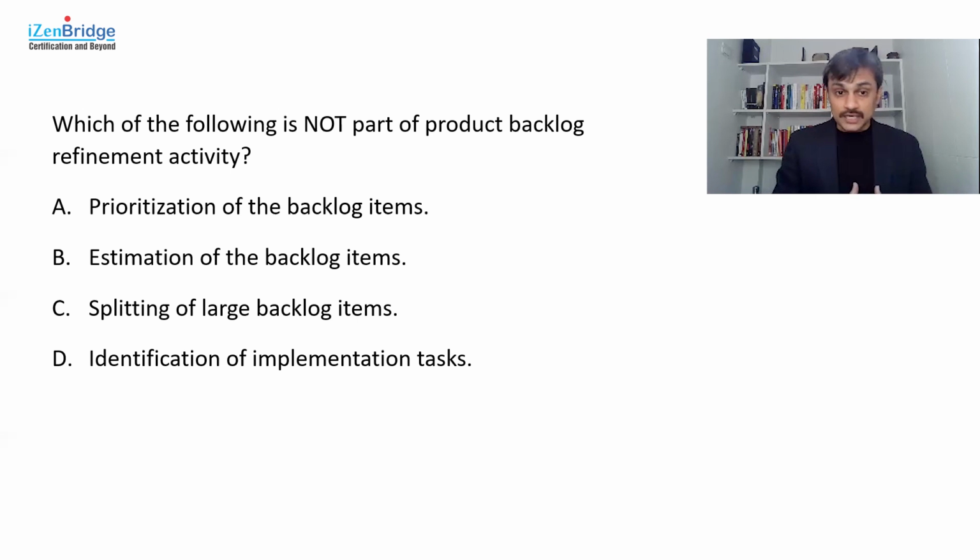So yes, prioritization of the backlog items is included, and estimation of backlog items is included, estimation using story points or high level estimates, which helps you in identifying the size of the item without identifying who is going to do it. So as of now, when you are doing a backlog refinement meeting, you are not clear who and when is going to work on this particular item. So you need to do an estimation which is at a size level.